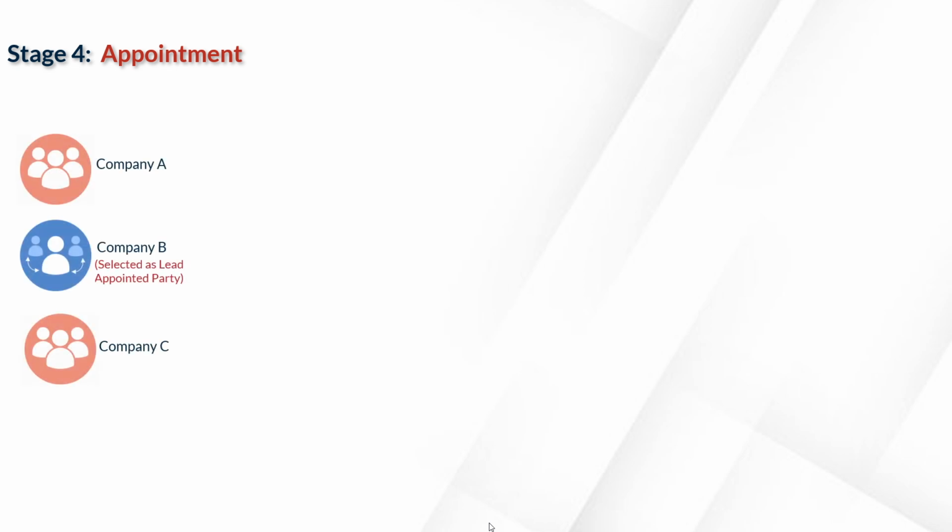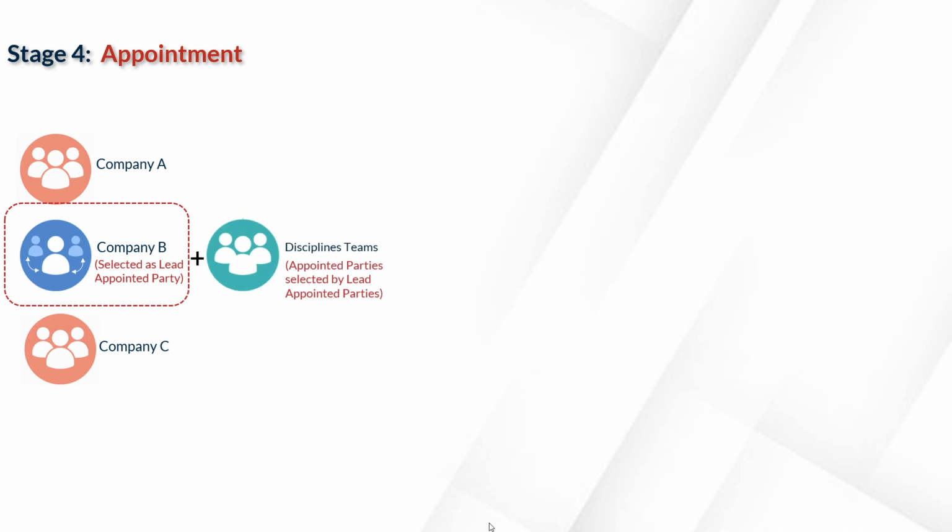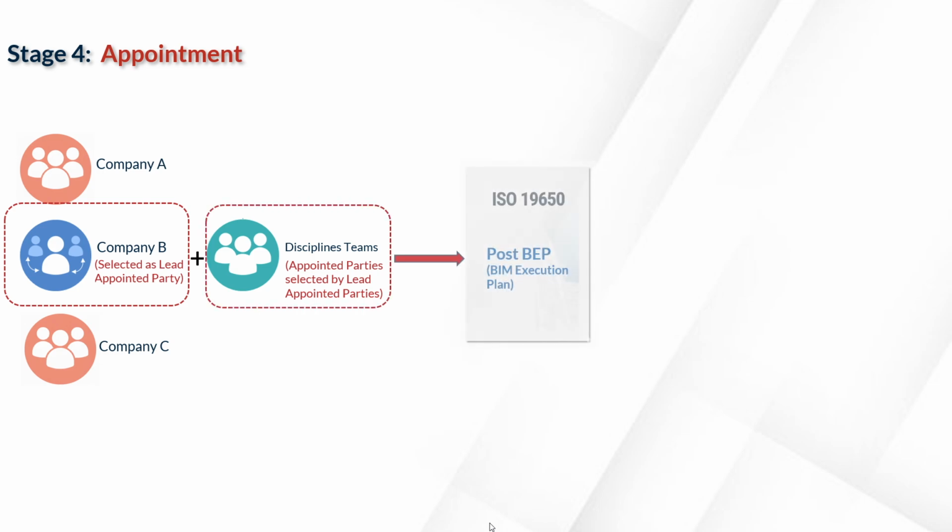Once the tender responses have been reviewed and evaluated, stage 4 of the workflow, that is the appointment stage, starts. Here, the appointing party officially appoints the winning bidder as the lead appointed party. Now, the lead appointed party then, in close coordination with their appointed parties, develops the post-appointment BEP. This BEP is the finalized BIM execution plan that clearly defines how information will be managed and delivered through the